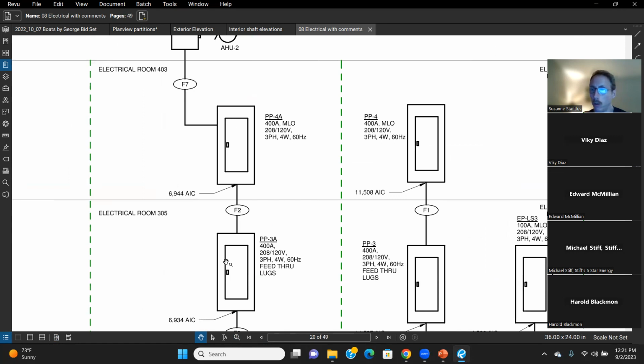So that's the info you get here, but you still need to go back to your plan view to actually see what this distance is. That's how they all play together. You likely won't be able to do all your takeoff by just looking at one sheet.